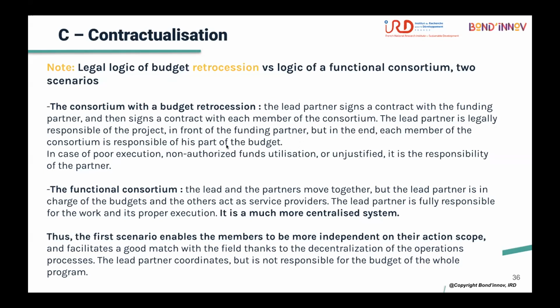Being responsible for their part of the budget means that each partner is responsible for justifying the use of their budget. And if part of their budget is not suitably used, the partner will be responsible directly to the donor.